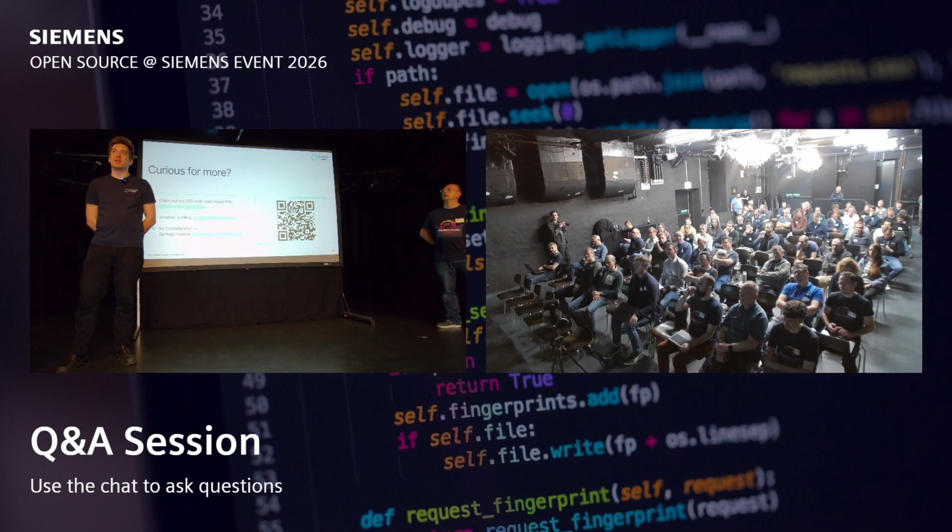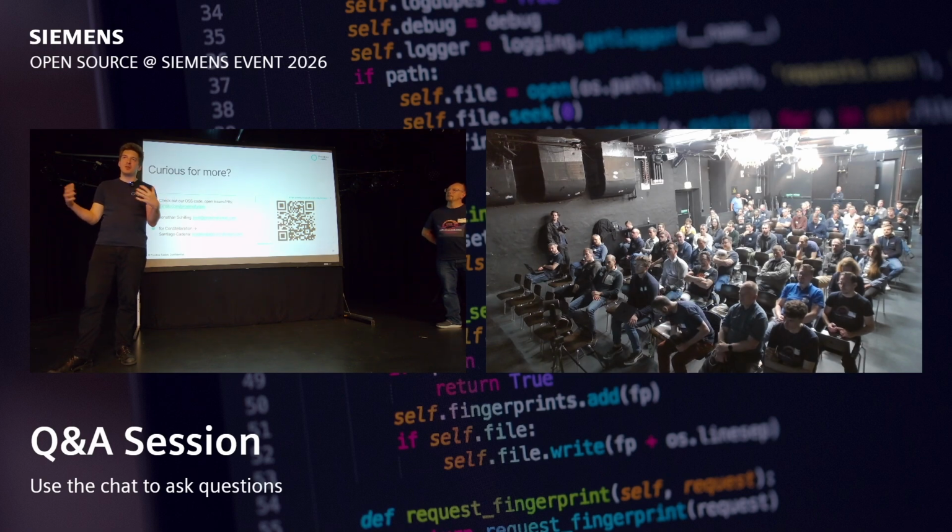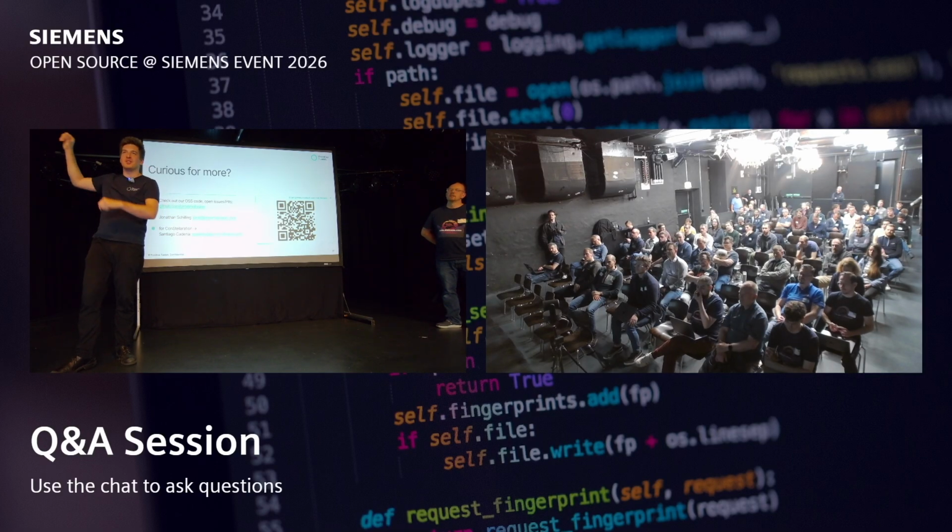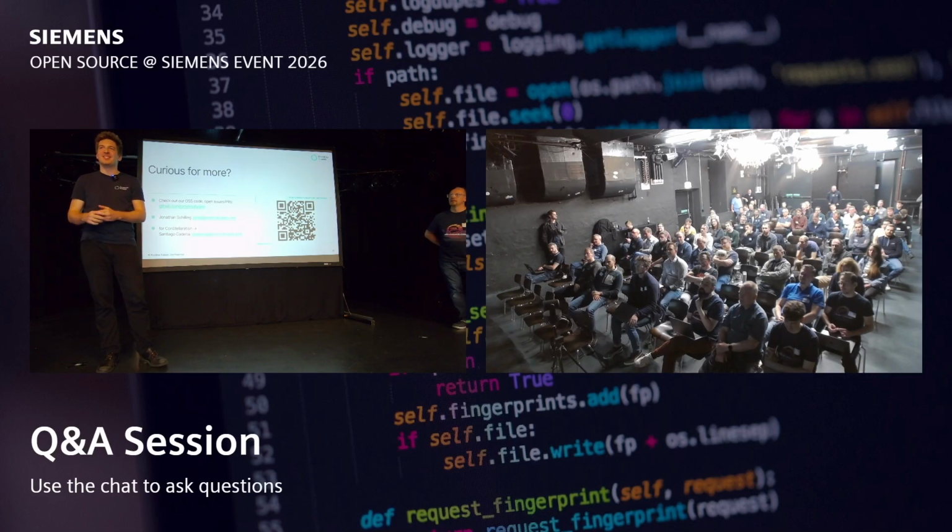Maybe I misspoke. The problem is not that we don't have the material coming in. The problem is we have so many components coming in at the same time, and we need to assemble them quickly enough that they don't pile up in the logistics hall, and then you can't find the one screw that is at the bottom of the pile.